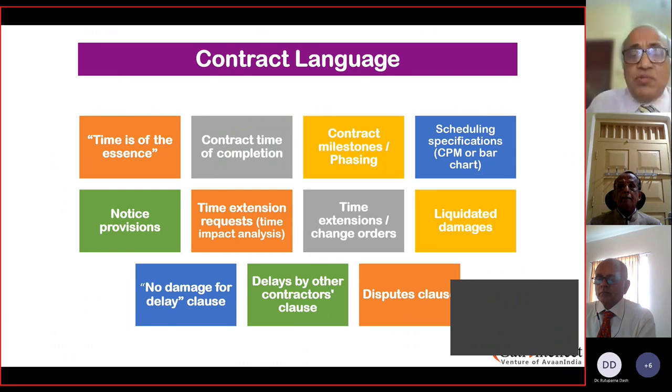The productivity norms are generally fixed so that there is continuous improvement year after year. Typically people look for a 5% improvement in productivity year on year, and then there could be a quantum jump in productivity with automation. All these aspects would be considered while fixing the timing. The other thing mentioned is the milestones. Typically, large projects, which are construction projects, have certain milestones.